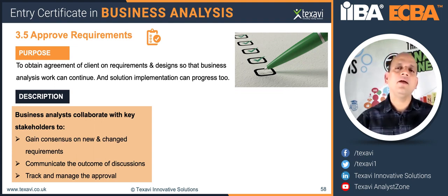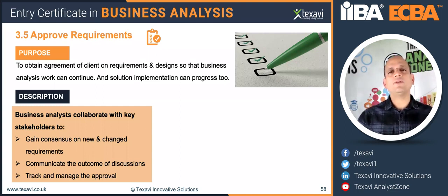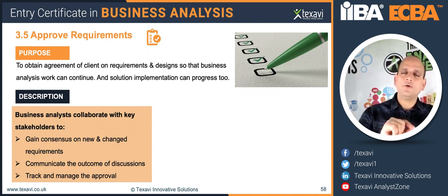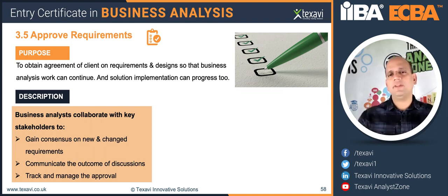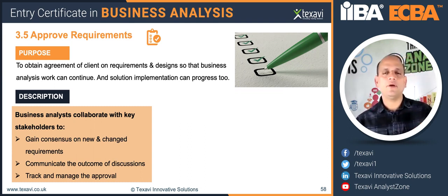And then once you have that, how are we going to manage that? Manage in terms of mentioning that this particular requirement was because of the discussion with the sponsors. This is because of the feedback from the customer. This is because of the survey that we did with the end users, and they've asked us to include this functionality into this build. So there's a rationale, a reason why you have got some requirement into the backlog. That's why we were talking about the traceability of the requirements, going not just from the requirements, but also above the requirements. So where does that requirement come from? What is the source of that? Who or what gave that requirement, right?